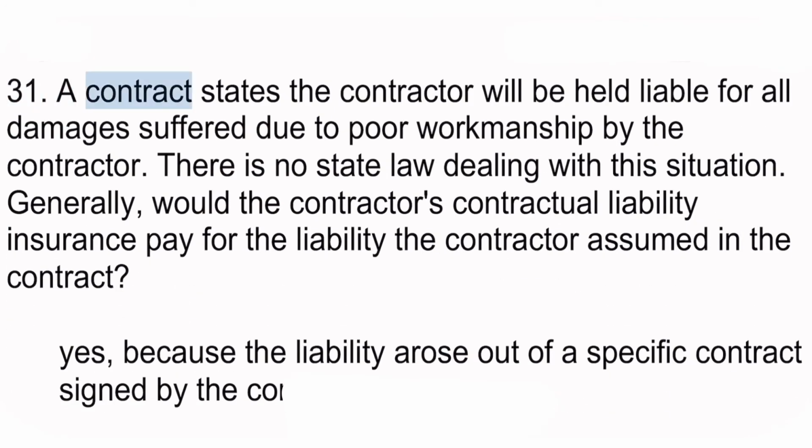31. A contract states the contractor will be held liable for all damages suffered due to poor workmanship by the contractor. There is no state law dealing with this situation. Generally, would the contractor's contractual liability insurance pay for the liability the contractor assumed in the contract? Yes, because the liability arose out of a specific contract signed by the contractor.